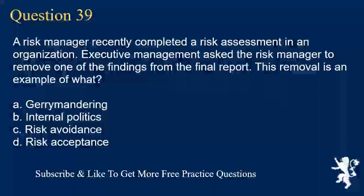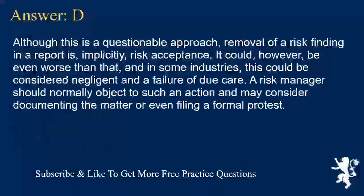Question 39. A risk manager recently completed a risk assessment in an organization. Executive management asked the risk manager to remove one of the findings from the final report. This removal is an example of what? A. Gerrymandering. B. Internal politics. C. Risk avoidance. D. Risk acceptance. Answer D. Although this is a questionable approach, removal of a risk finding in a report is, implicitly, risk acceptance. It could, however, be even worse than that, and in some industries this could be considered negligent and a failure of due care. A risk manager should normally object to such an action and may consider documenting the matter or even filing a formal protest.